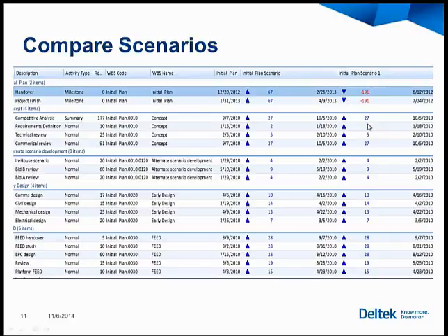Actually, most of these tasks wouldn't require aggressive acceleration or even acceleration at all on the plan. In fact, the overall project is going to have to accelerate by 191 days. But concept, alternate scenario development, early design, and FEED, they actually don't need to make cuts at all. So further down, I should have put a second one of these up with construction on here because I'll bet they need to make the cuts for an overall cut of 191 days.